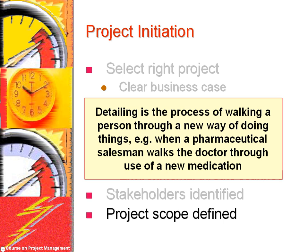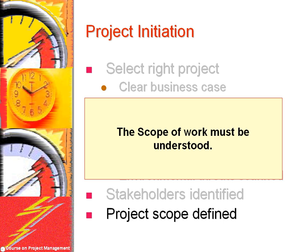For example, in implementing a new computerized physician order entry, a pretend patient visit might be arranged, the clinician is asked to pretend to enter data, and the events in the electronic health record are reported. The point is that the scope of work must be understood by all people affected by the project, so there is no surprise later, and so that the scope can be modified if it is not exactly what is needed.